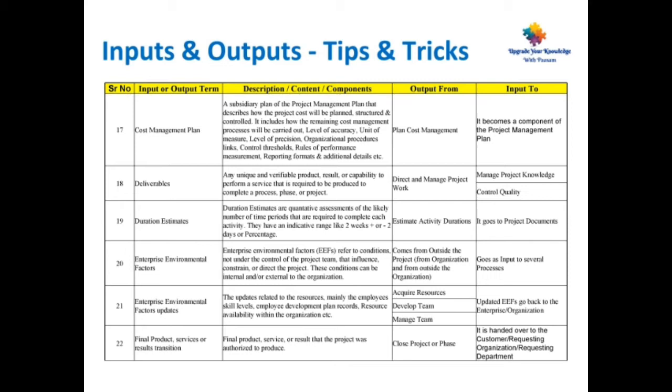Point number 20, EEF, enterprise environmental factors. EEF refers to conditions not under the control of the project team that influence, constrain or direct the project. These conditions can be internal or external to the organization. It comes from outside the project, from the organization, from outside the organization. It goes as input to several processes.